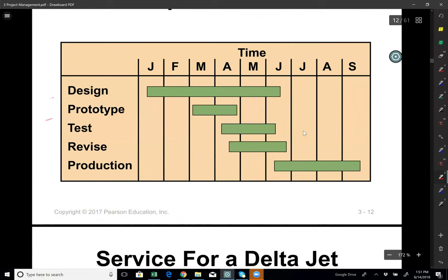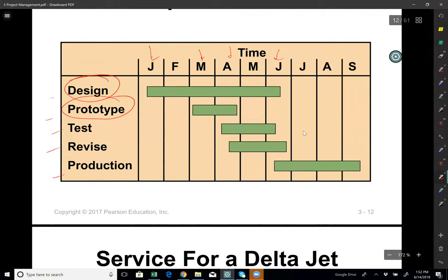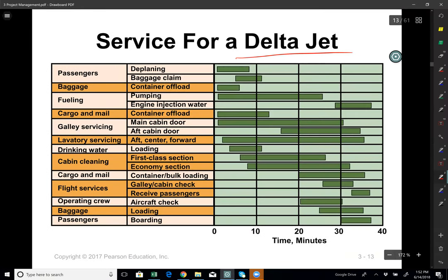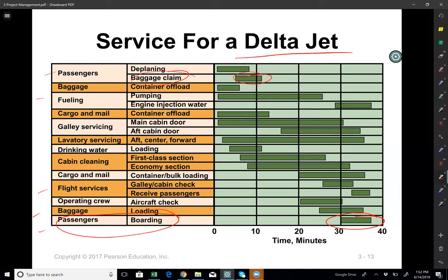Let's start with a simple Gantt chart. Imagine I have five activities — for example, a design activity starts in January and ends in June, and prototyping starts in March and ends in April. I show the breakdown on a timeline; that's called a Gantt chart. For a more detailed example like Delta Jet, there are different components — baggage claim might take 10 minutes — and I need a sequence of activities, some sequential and some parallel, to complete the project.